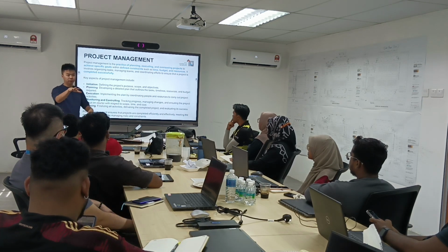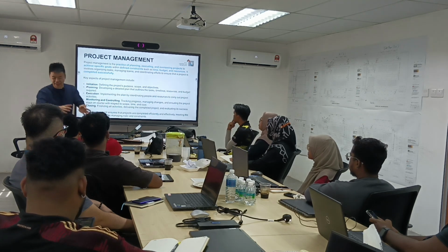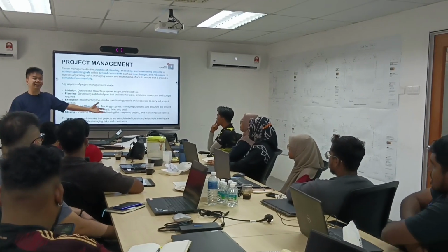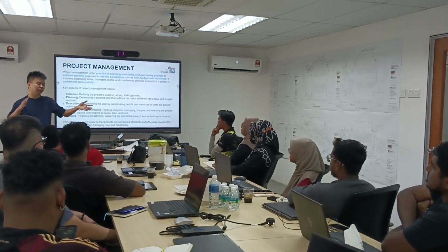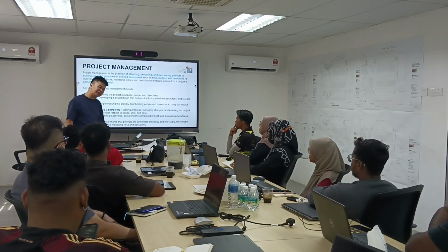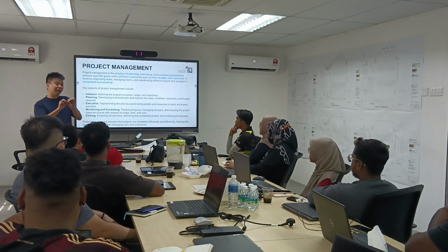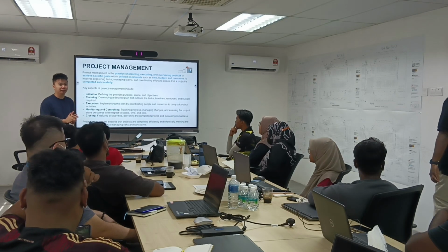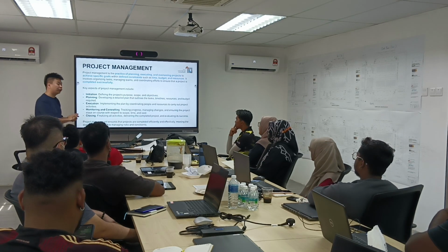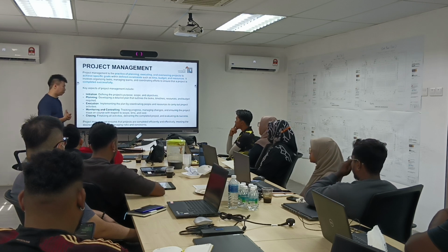But a lot of our people, what I see is that you guys tell the subcon what you want, and then you go busy with other stuff. You don't go and actually make sure that this activity is started and it's already jalan. So tomorrow when you come back, then your taiko like Matthew or Edmund asks you, hey, why is this not done? Then you guys look at the subcon, yeah, why is this not done? So you make yourself lose control of the project. This is not a good thing, because as project management people, we want to take control of the projects. So monitoring and control is very important.